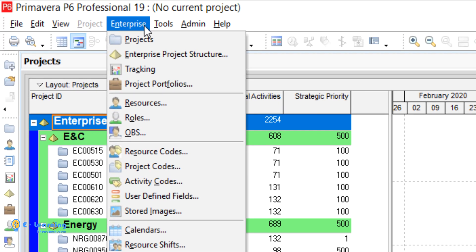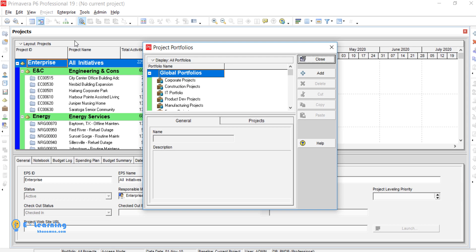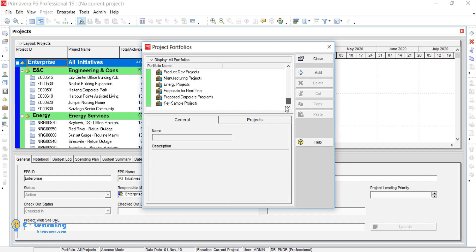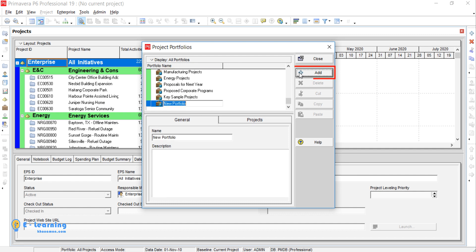For creating a portfolio, from the top drop-down menu select Enterprise, Project Portfolios. Here you see the sample portfolios. Click the Add button and type the name of your portfolio.